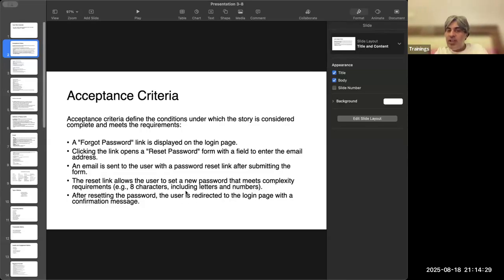After 10 days, PO says that he needed numbers also, but there was no official documentation to it. So you need that. If the acceptance criteria is there, and then PO says, boss, no, 8 letters are not accepted. Stakeholders want 15-letter passwords. Is it a fault of developers and QAs that they have built 8 characters? No. How can you say? Because PO, boss, we discussed this is the scope of this requirement. So if the scope is clear, then the conflicts are largely reduced.